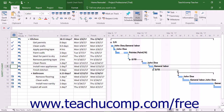When dealing with a project that has fallen behind schedule, these are the tasks whose duration must be shortened if you are to bring in the project's deadline. The process of shortening the duration of the critical tasks in the critical path to shorten the project deadline is also called crashing the critical path.